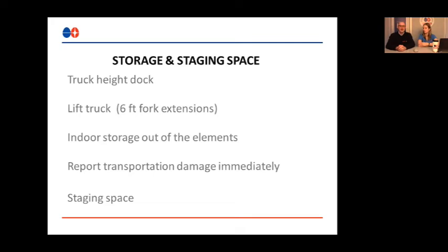Staging is different in that wherever the bank of incubators or hatcheries is going to be, it's preferable if there's a staging space that our installer can have crates or boxes, have a space prepped that they can draw from that's close to the workspace, if at all possible in the same room, perhaps in a corner or somewhere segregated. It just makes for less point-to-point travel. It can be challenging if the staging space is on the other side of the building. Sometimes you have to work with the building layout, but if at all possible,